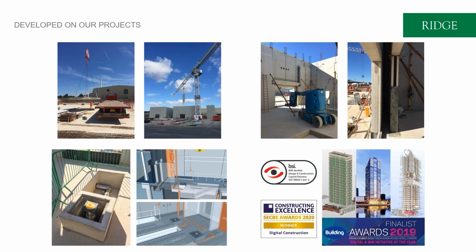And at the time, because of the nature of precast concrete being designed and finalised much earlier in the process than some other techniques, we had to have confidence in the number of builders work openings required in the project, and that the size of the builders work openings were going to be appropriately sized for the services to be spaced for the Firestop product to be compliant.